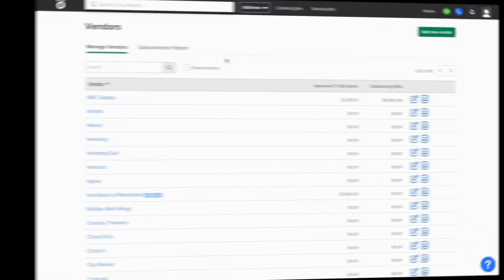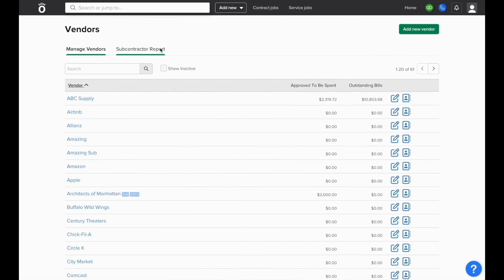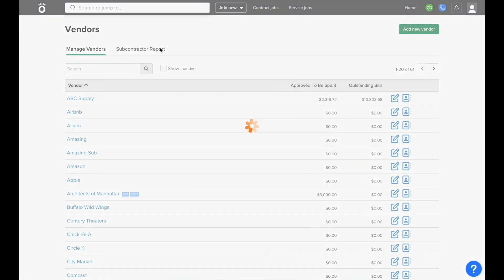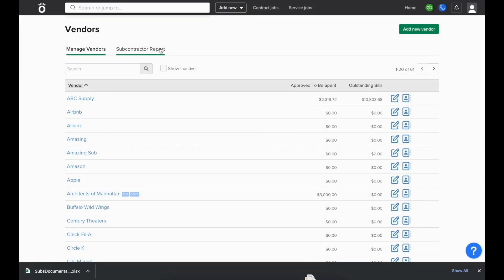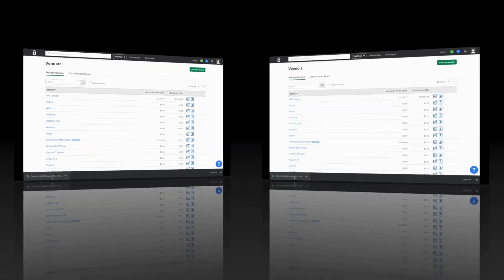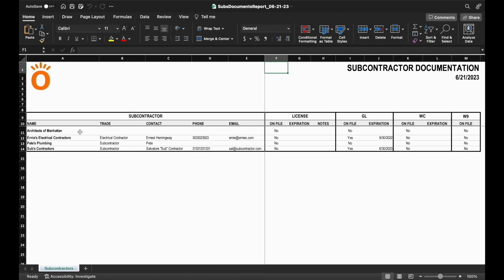If we need to see which subcontractors need to provide us with more up-to-date documentation, you can run the subcontractor report in the vendor section. This will give you a list of all vendors in the account that have been marked as subcontractors and let you know what documents are on file and when they expire.